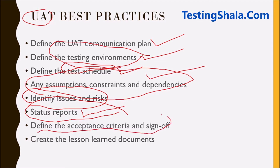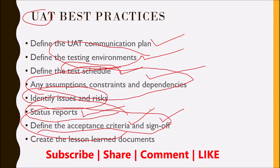There should also be a mechanism for defining the acceptance criteria and sign-off. This is the last and very important aspect that needs to be taken care of, because if you do not define this properly there is no end to testing. We should clearly define the acceptance criteria — when testing activities are completed and if they meet the criteria, then business users and end users are going to sign off saying that what the developers have implemented is working as expected and they are ready to release this product into the production environment.